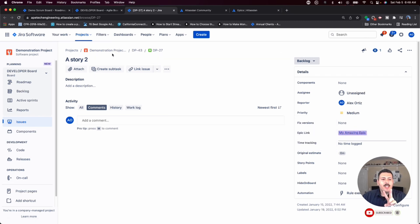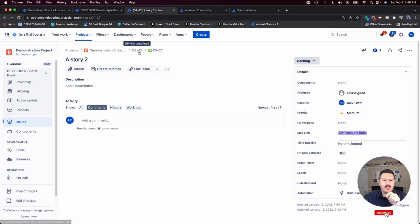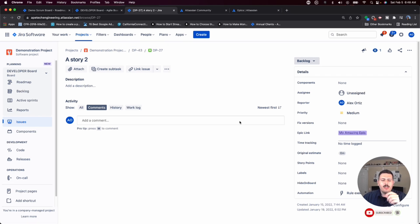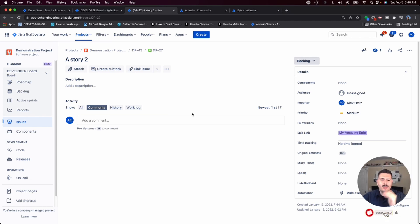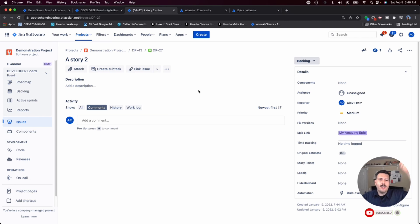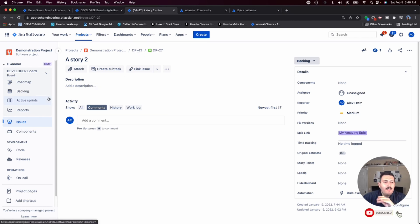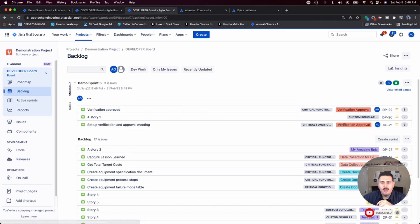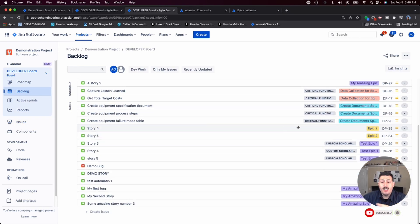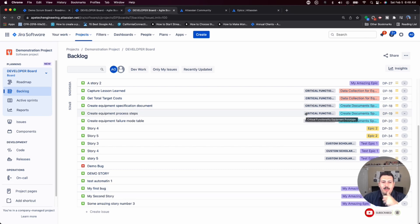Two, you'll notice that in this upper header here, I used to only have DP-27 as a story, but now there's a slash and an epic before it. Not sure why it's saying undefined, but this is how you can also tell because Jira will actually give you the parent of every issue. So if it's a subtask it'll show you the story and if it's a story, it'll show you the epic. And if you're on the premium and you have your epic tied to an initiative or some other higher level issue type, it'll also show you just that one layer up. So that's another great way of knowing if a story belongs to an epic because it has that relationship up there. And then the final way, which you probably seen over and over is there's going to be these colors on the side. So when you're looking at these stories, you're going to be able to see which epic these stories belong to.